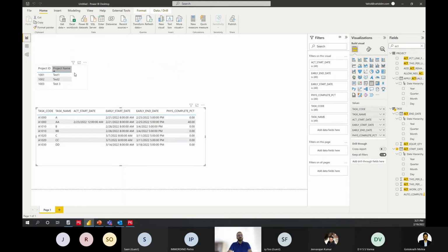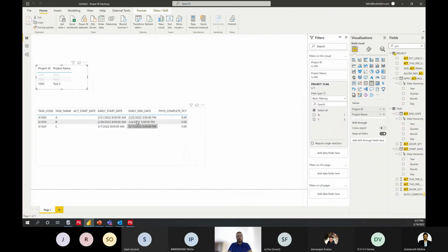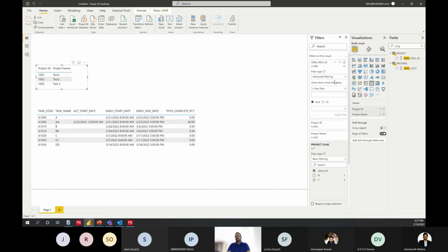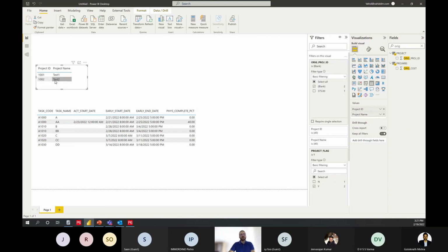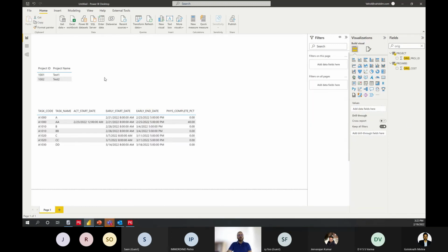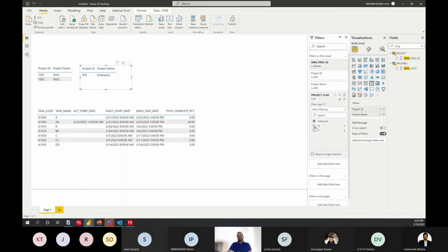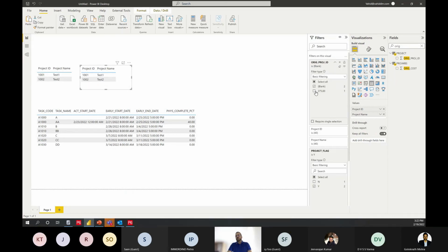So if we go back here, we can see this project here with all the items and this one as well. But if you want to see just the current projects, you can add the original project ID here and then make sure it just shows the blank one. So yeah, 2 items are here. If you want to add another table here and just show the baseline, you can copy and paste this one, and then here change between yes and no.